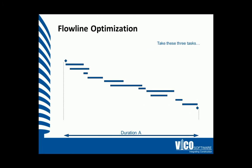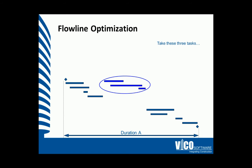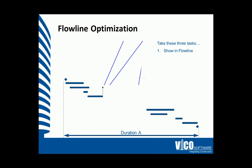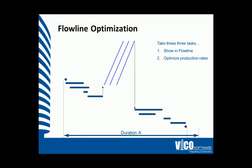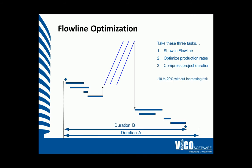Let's start by isolating these three activities and representing them in the float line view. The slope of each line is a representation of its duration. Let's now align the production rates. In this instance, this means making the middle line faster, or matching the slopes of its predecessor and successor tasks. We have now compressed the project's duration by 10-20% without increasing the risk of the entire schedule.